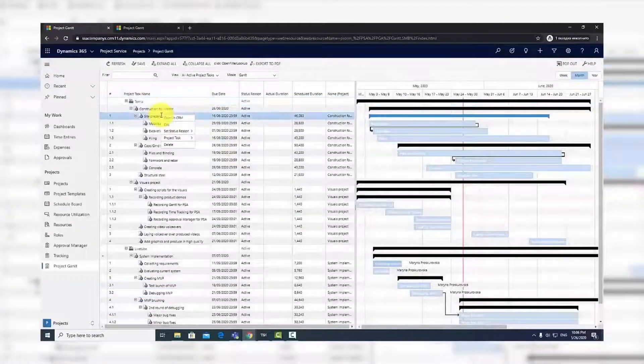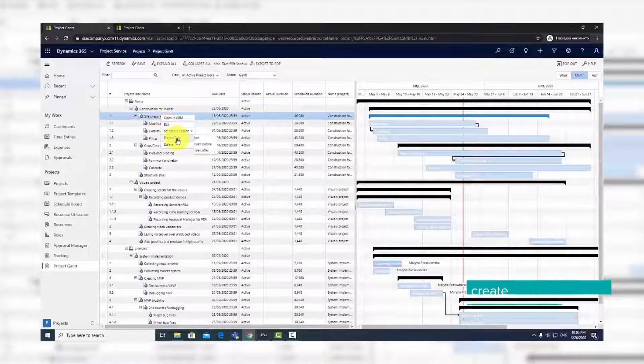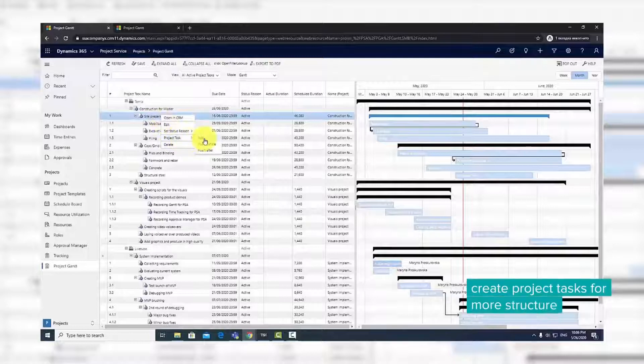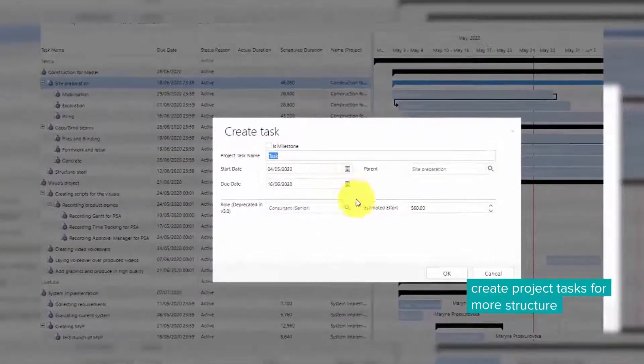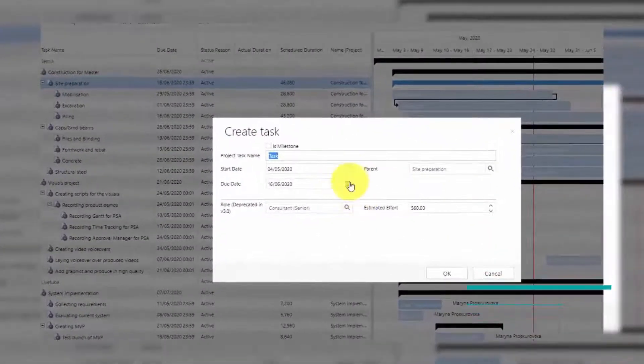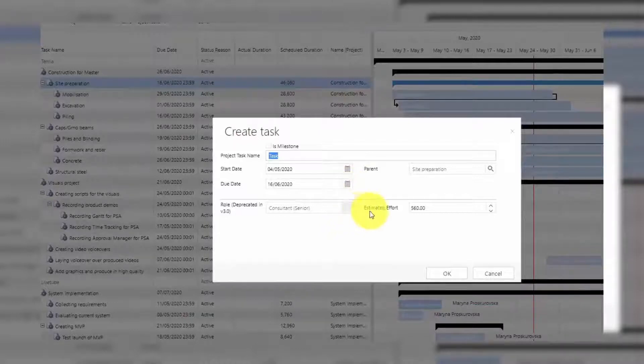To create a project task, select the project, open the context menu, and select Add Child Task. You will get a pop-up form with pre-filled project information that can be edited.